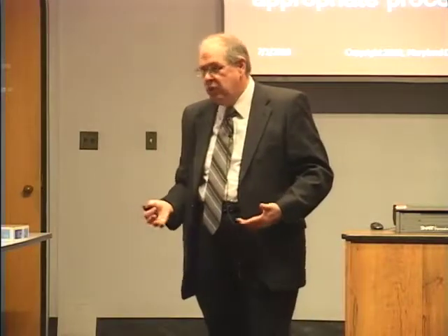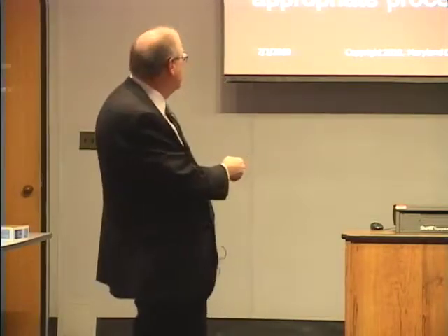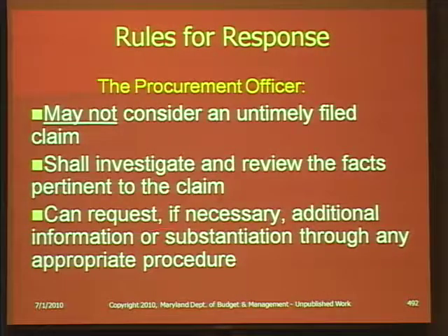Does it hold water? Do you have anything in your files that obviously repudiates it? Do you agree with them? Maybe the contract manager says, yep, everything they say is true. If you agree with them, then you uphold the claim. Usually I don't think that's what we do, but you'll have to see. But you shall investigate, review, and if necessary, you can request additional information or substantiation. You can go back to the vendor and say, here's the additional information I need to really make a decision. Or you go to your contract manager or some other source for information that allows you to make a decision.